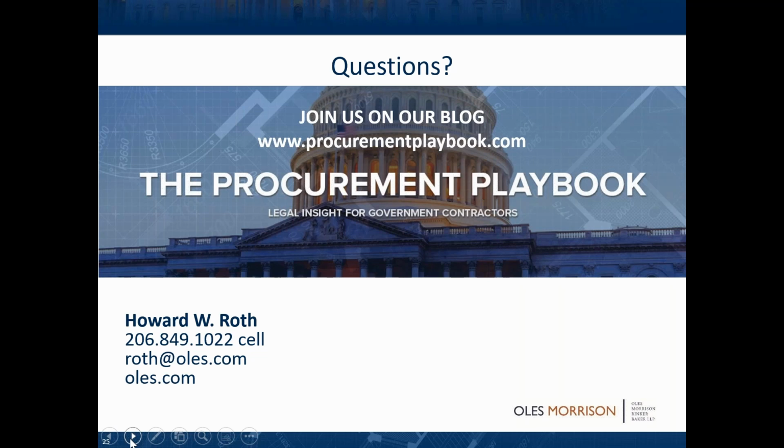Well, there are really no reported decisions. So it's all sort of word of mouth. It all depends on your relationship with the contracting officer. If you are suspended and you're on standby, then you need to invoke a constructive suspension, and you can be paid for your costs under the suspension of work clause. The problem with the suspension of work clause is you don't get profit. So what most contractors try to do when they're suspended is look at it as a constructive change to the contract, because for a change you can get profit. But the key thing is you've got to write your notice letter. If you actually try to litigate these things, it takes 2-3 years. There hasn't been enough time to have any reported decisions.